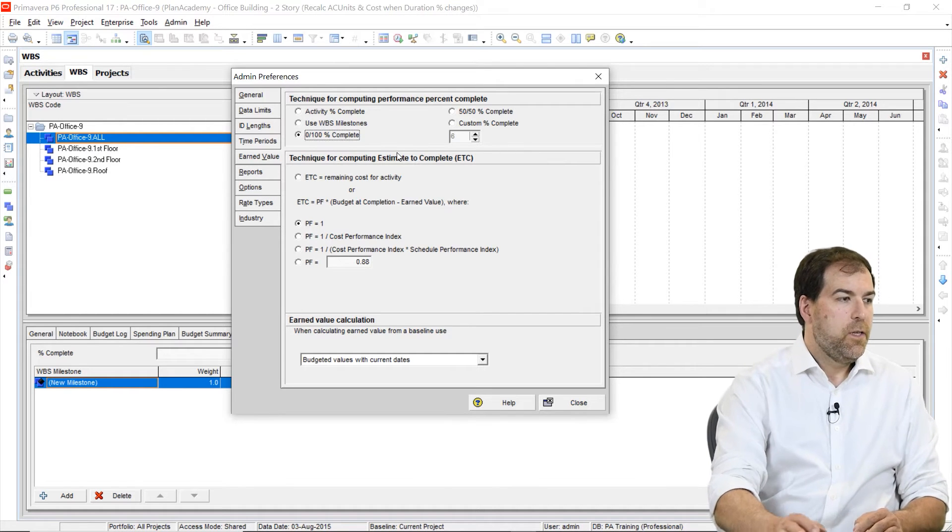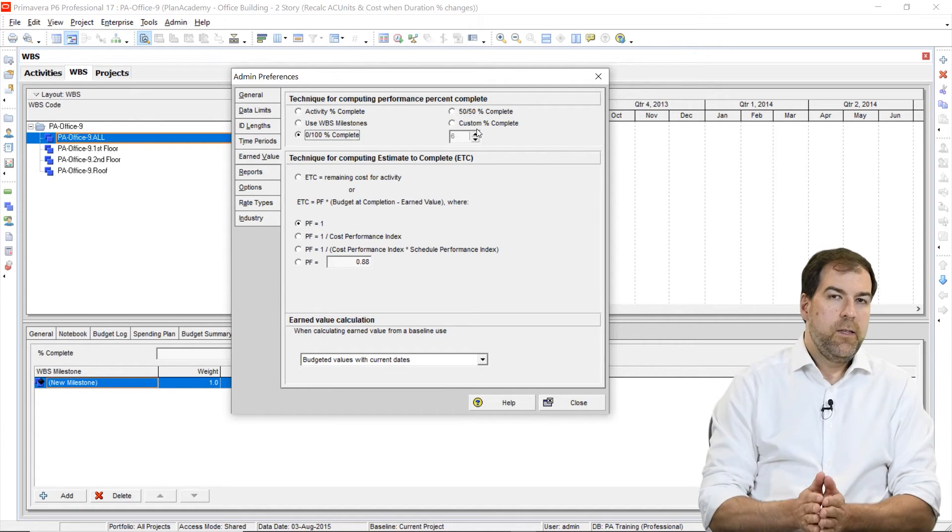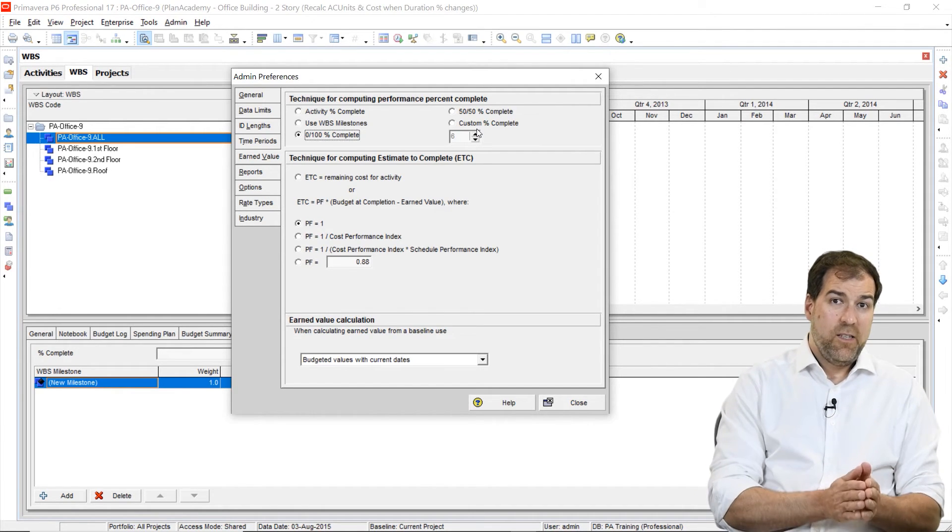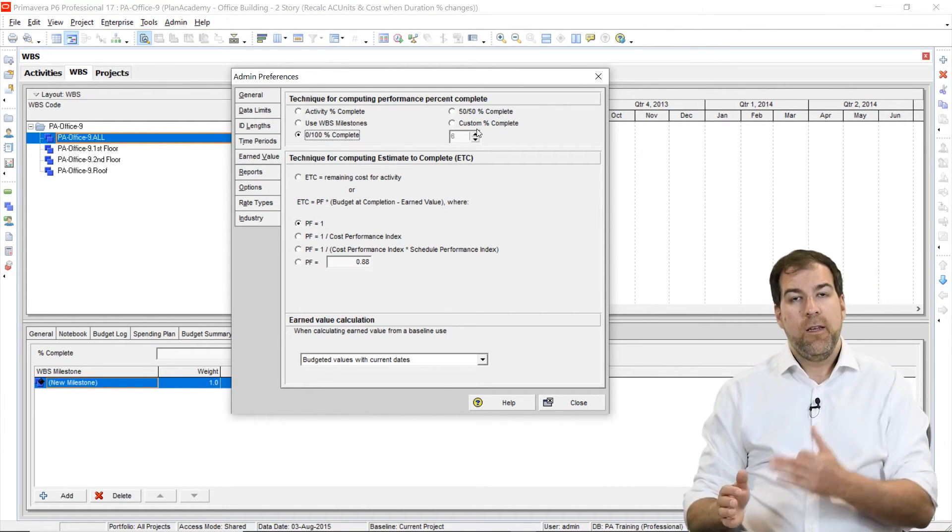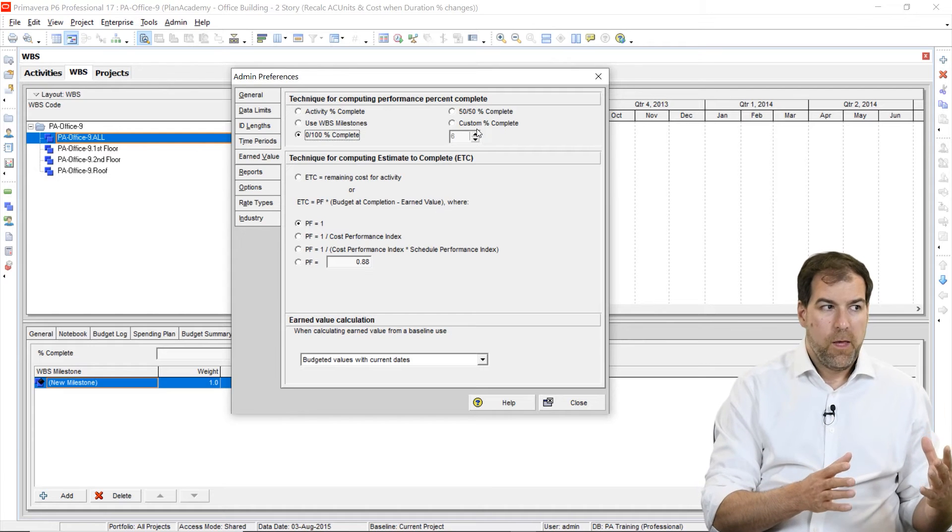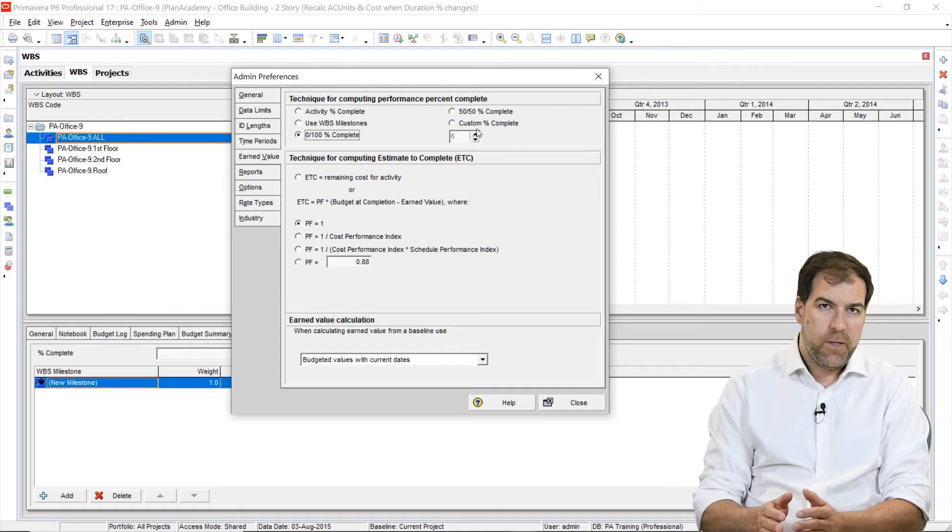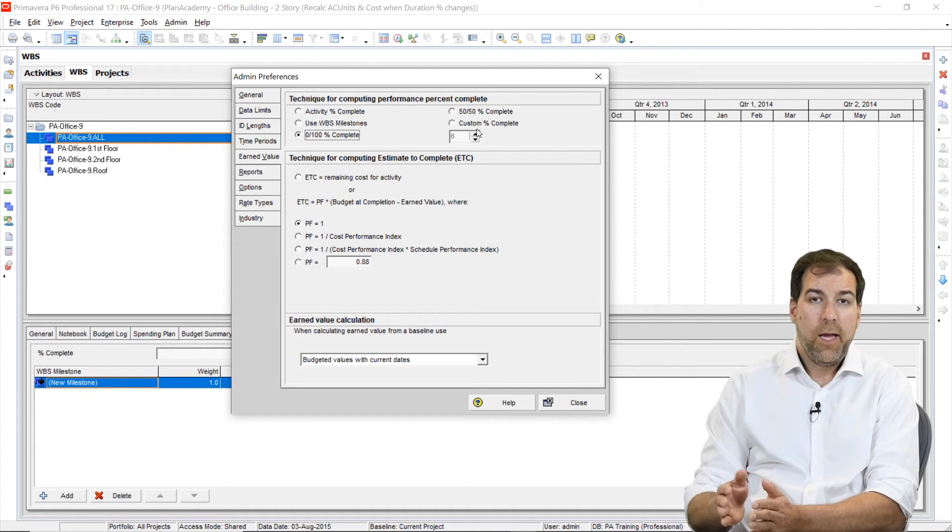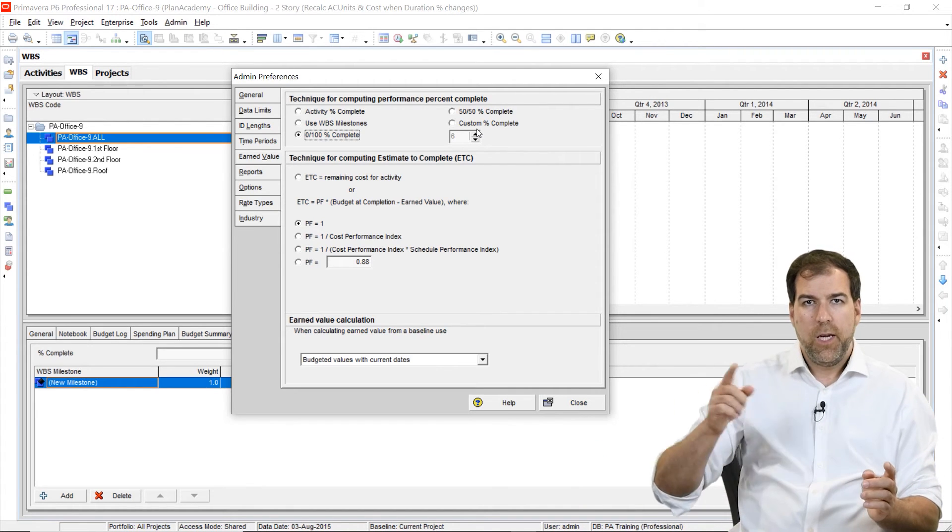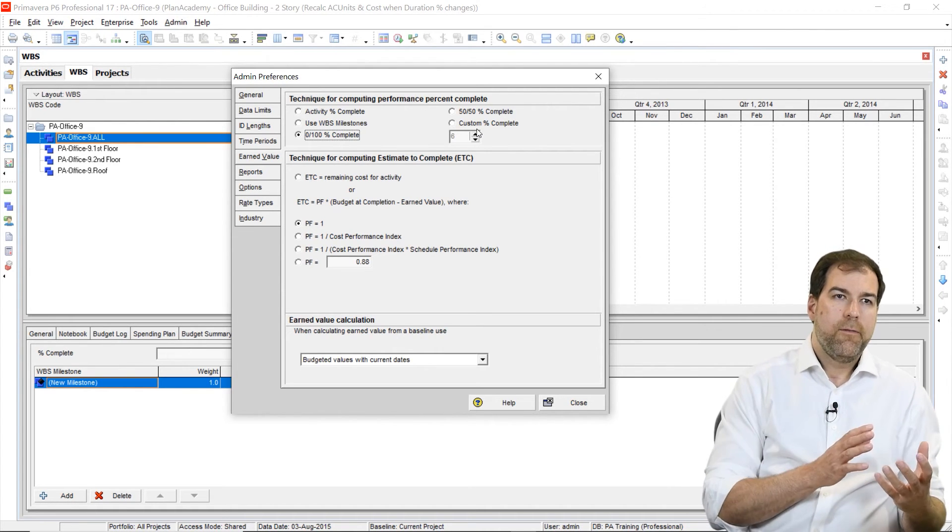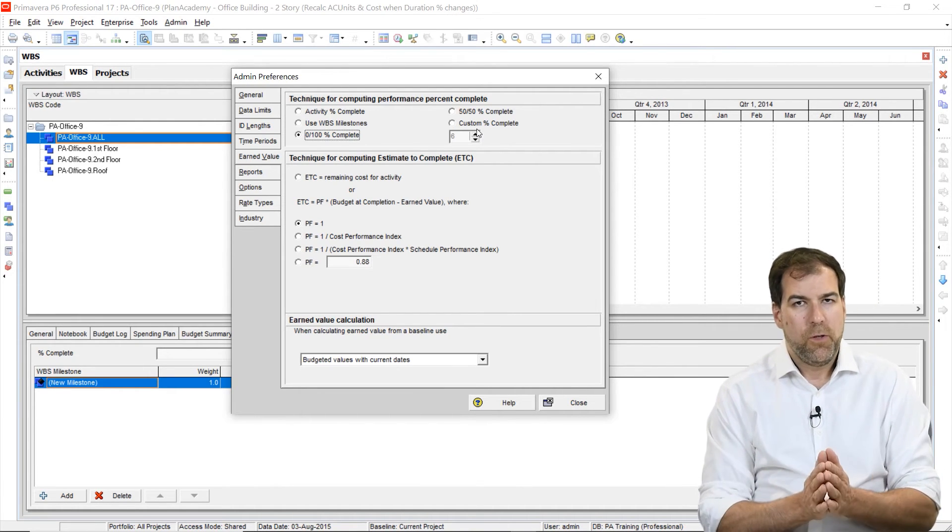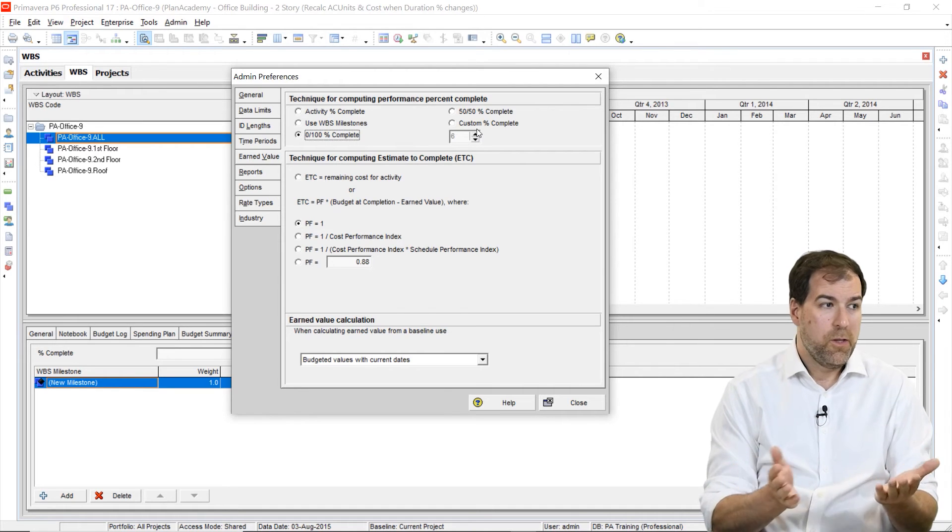Okay, another option is zero slash 100% complete, and it's similar to 50-50% complete. In these options, an activity that is 0% complete stays 0% complete until it's 100% done. And only then is it 100% complete and factored into my performance percent complete calculation. Same thing with 50-50, the other option. And with 50-50, if the activity stays 0% up until it's halfway done, and then it's 50% complete, and then once it's 100%, it's 100%. So we have these three kind of different options there. So both of these options could be used to drive the calculation for performance percent complete. Again, I don't see people use these very often or at all, but you have flexibility here in Primavera P6 in case you're wondering what they do.